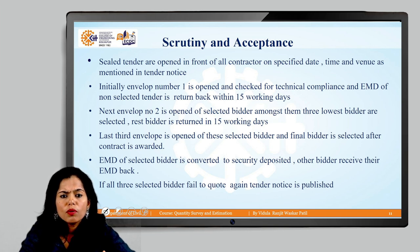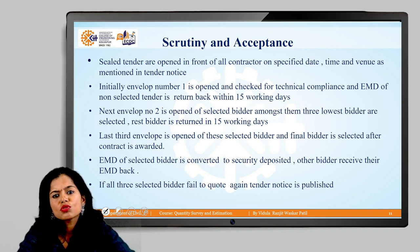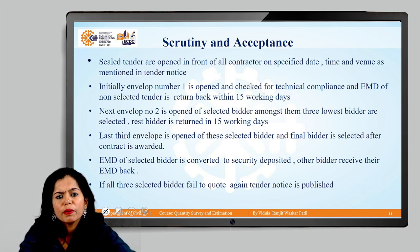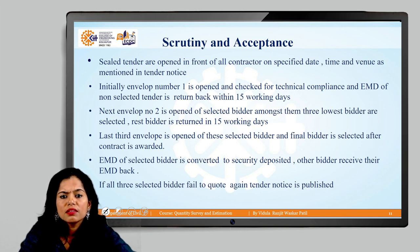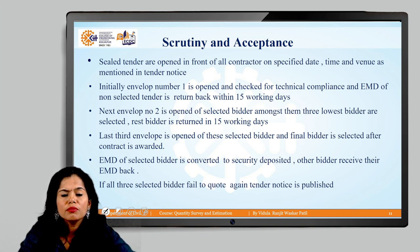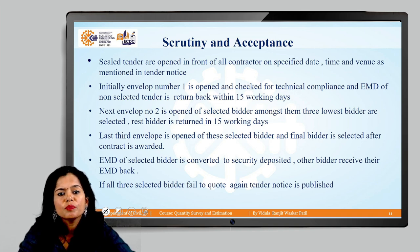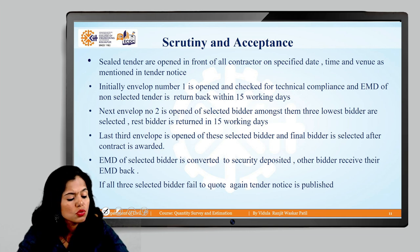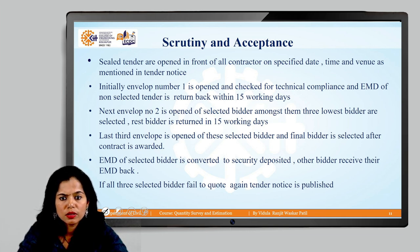The lowest three bidders are identified and the remaining contractors' EMDs are returned within 15 working days. The third envelope of only these three lowest bidders is opened, and every page of the document is thoroughly scrutinized to finalize the final contractor. The EMDs of the last two bidders are returned within the next 15 working days.